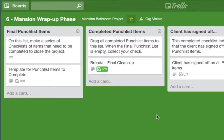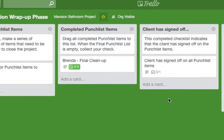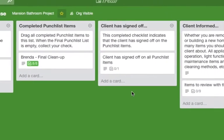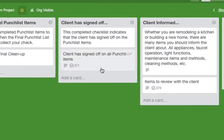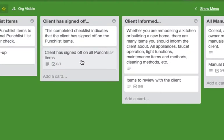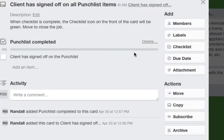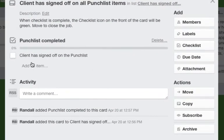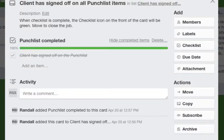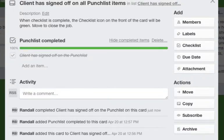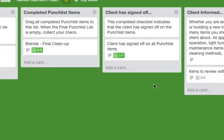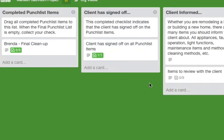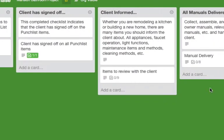So when the client has signed off on this, you may have a form to have them sign off saying all the punch list items are complete. You'll merely turn this over and they've signed off on the punch list and now you're ready to close the job out.